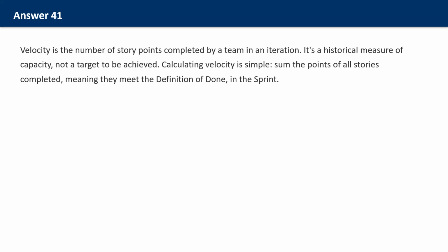For exam scenarios, understand what these charts reveal and when to use each. Burn down for tracking progress toward a fixed scope. Burn up for tracking progress when scope might change.